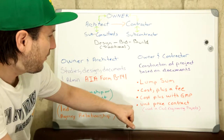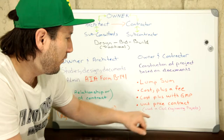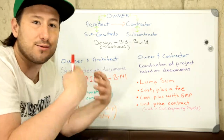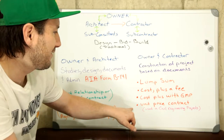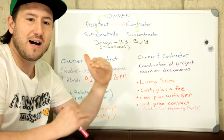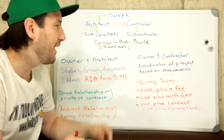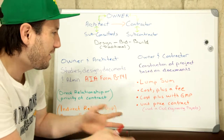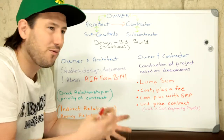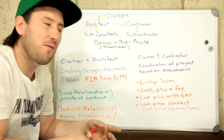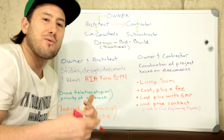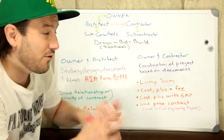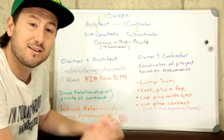The unit price contract is used mainly in civil engineering projects like bridges and tunnels. It is exactly what it says: there will be a table of values, and the owners will decide which portions of the work they want the contractor to do based on their unit rates. The unit price contract is used in other areas as well, but that's basically the overview.